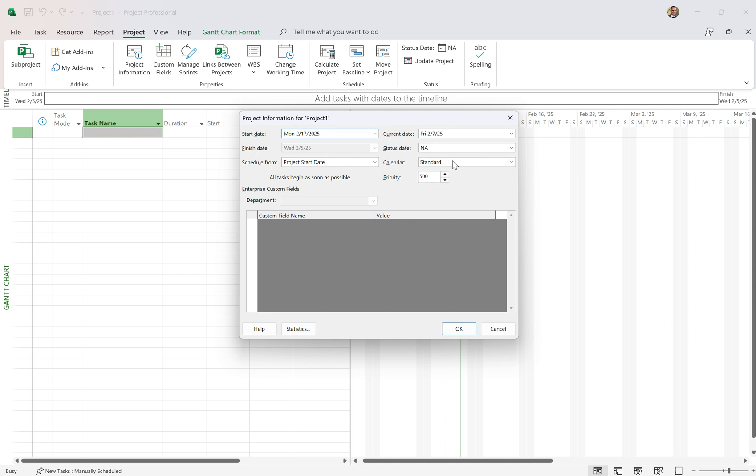Calendars — you may want to set up a calendar. If not, it's going to be the default 8 to 5, Monday through Fridays. There's not going to be any holidays, no vacations, no company shutdown. So the first thing you want to do is create your own personal calendar, adding exceptions. I have videos on how to set up calendars in Microsoft Project — go take a look at that. But you can use the standard; it'll get you 90% of the way there, it just won't allow for those holidays.